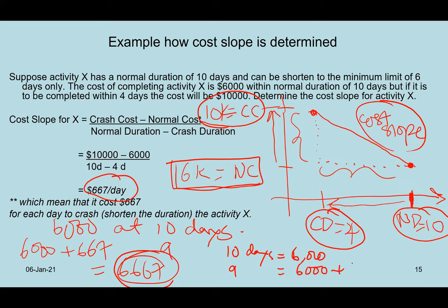6,000 plus 667. If you want to decrease the project duration to 8 days, meaning to say now 6,000 plus 667 plus another 667. So 667 is like a factor for easier calculation. Okay, for easier calculation, if the client asks you, the project's original duration is